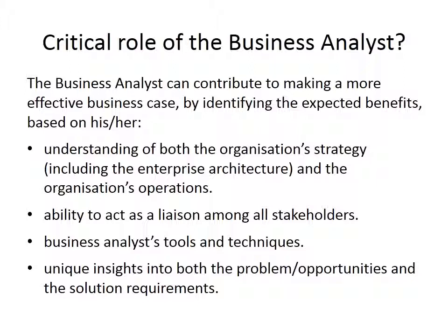Finally, I think the business analyst has a good set of tools and techniques that can support this identification of benefits. So I'm going to list a few of those tools and techniques that I believe will support the identification of benefit, but there's obviously a lot more and that can come from many different parts of the organization, as I said, not just the business analyst. Some of the more specific business analyst tools and techniques are concept modeling, benchmarking and market analysis, data mining, mind mapping, process analysis and modeling, business capability analysis. All of those tools and techniques will be critical if you really want to identify the value, the right benefit that we want to achieve through this initiative, through this project.